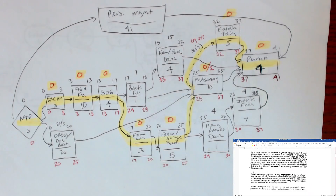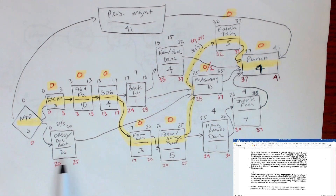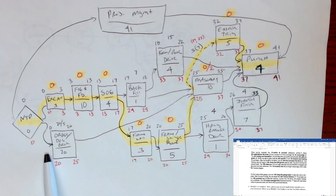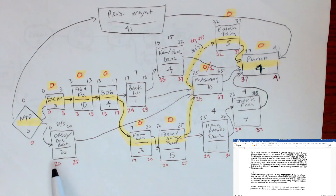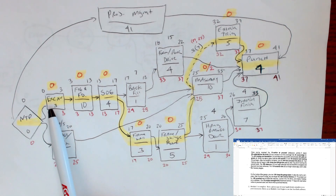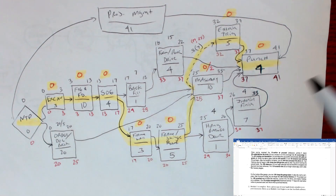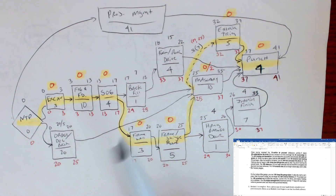If we switch over to the schedule, we see the notice to proceed is here, then it goes to excavation and order and deliver brick. Order and deliver brick is after excavation. The footing and foundation will follow the excavation, and then the excavation precedes the slab on grade. In my text, the numbers are just identifying each activity with a particular number.